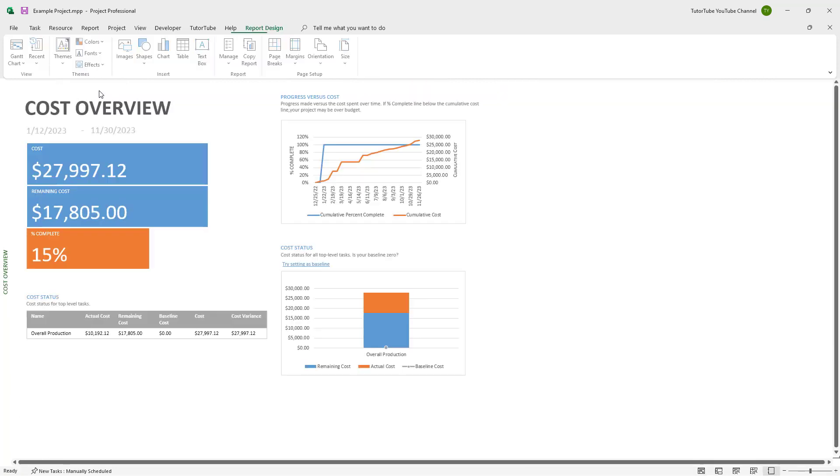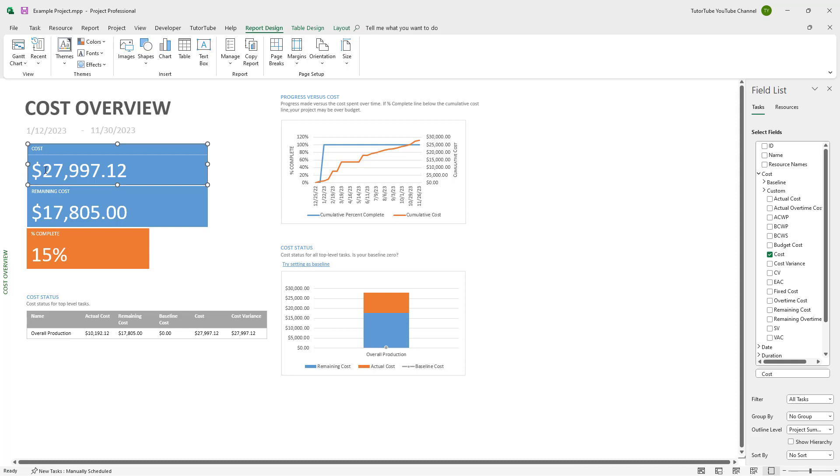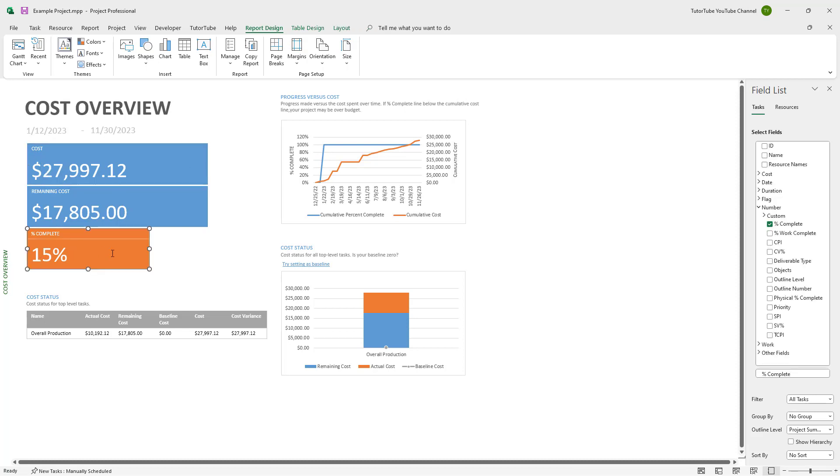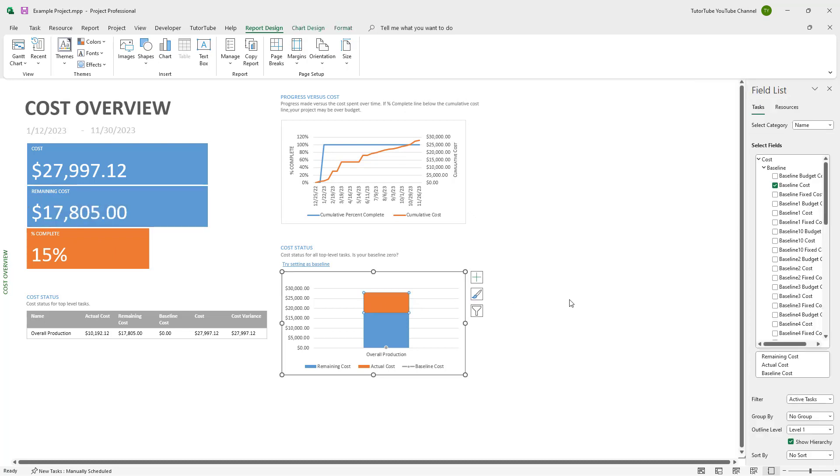If you go to the cost overview, you can see the overall cost, the percentage complete of the work, and the remaining cost for the overall project as well.